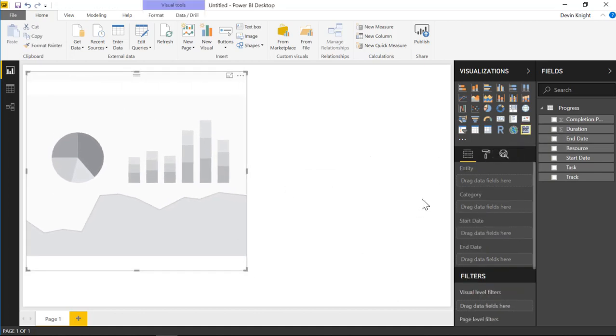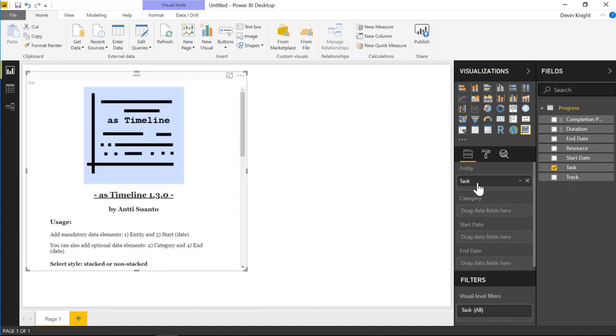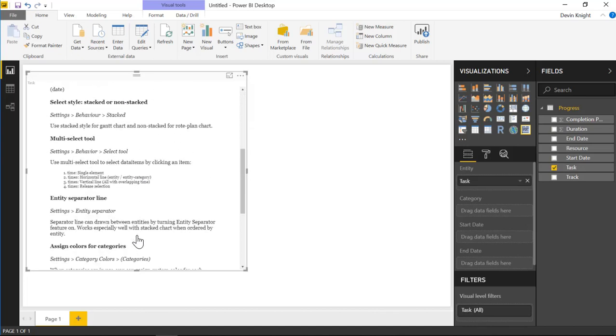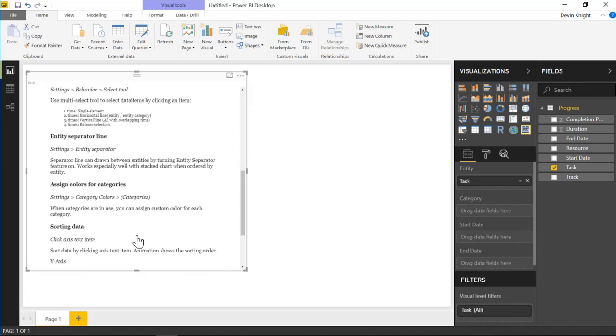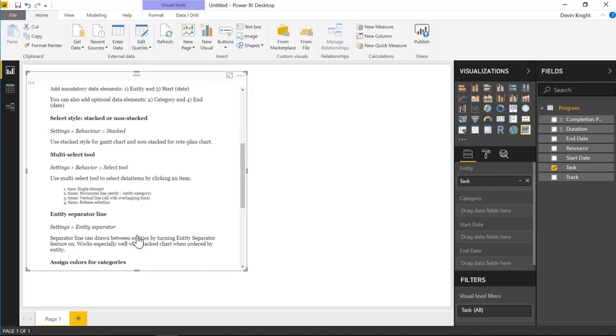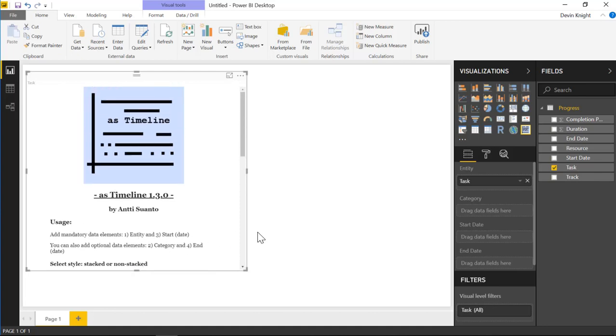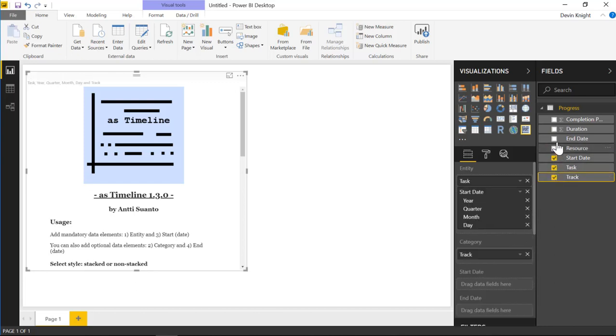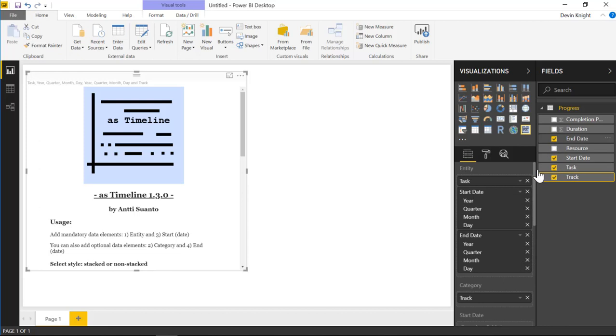We can add that As Timeline visual here and start to add different data elements to it. What we want to do is add the Task column to the Entity here. You can see that there is some additional documentation that pops up when you do that, which is pretty helpful. We're also going to add the Track to the Category section, and then we'll add the Start and End Date to the Start and End Date columns here.